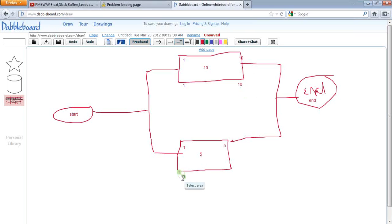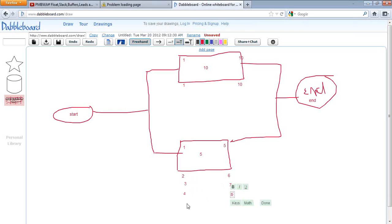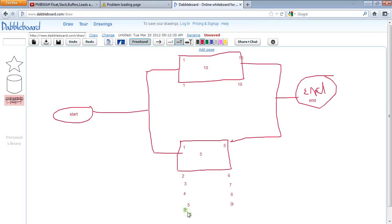Now look at the five-day activity. If I start it on day two, it gets over on day six — no problem. If I start it on day three, it gets over on day seven — fine. If I start on day four, it finishes day eight — fine. If I start on day five, it finishes on the ninth day — still okay. If I start on day six, it finishes on the tenth day — project still does not slip.